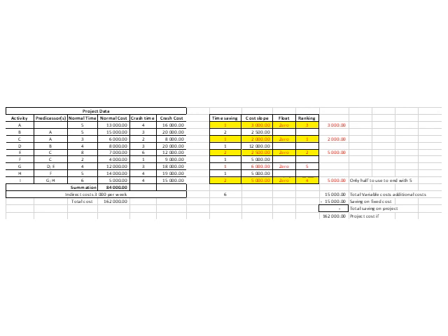Some of you actually quoted quite well, but if you want to have a look at it, please have a look on page 187, and you will see that the increase in cost over the reduction in time will give you your cost slope, or in other words, it's your crash cost less your normal cost divided by your normal time less your crash time. So what we do is we calculate each one of those, and let me just get to that memo.